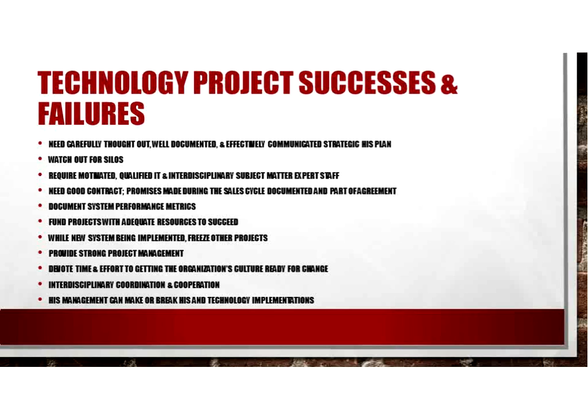Now, what vendors sometimes will try to do is to underbid their competitors in the RFP proposal process and skimp on expensive hardware with greater capacity. So you have to make them commit in a contract to what they are saying they're going to do. And this will make sure that their configurations are realistic given the size and volumes associated with your organization's system.